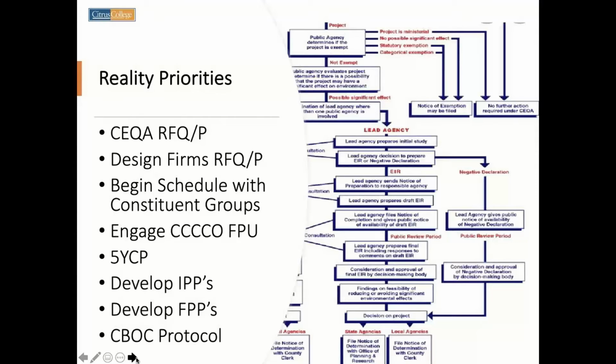It's not on the book yet. I'll tell you a little bit about that one in a second. But normally, for each one of our projects, we will have at least 3 of them that will have formal FPPs done. The work that goes into that is 2 or 3 months' worth of work. Typically, a district can spend anywhere from a small amount of $25,000 upwards of $60,000, depending on the complexity, for one FPP.